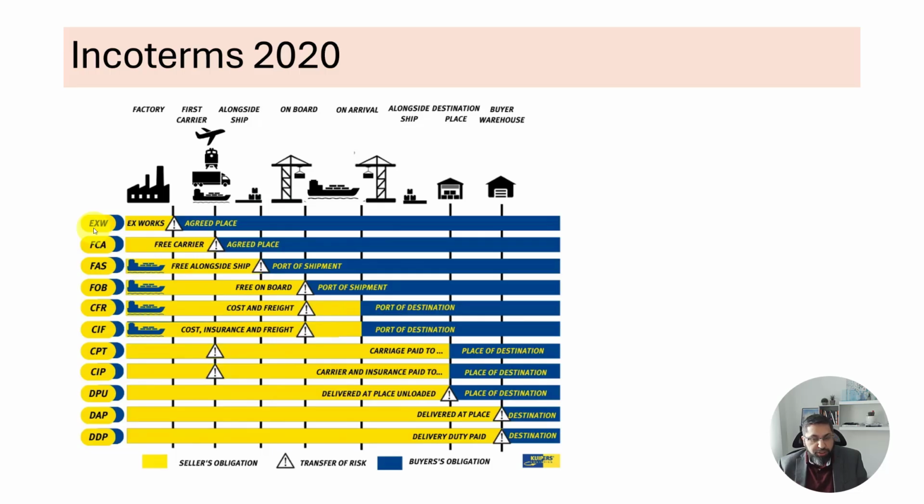But the purchasing team just compared the price, which was the EXW (ex works) price, because usually suppliers give you a price for the goods without adding in transportation costs, just an ex works price. And they said, oh, we can save this many dollars, but they're actually going to end up spending more on transportation now. So when you are selecting a supplier, it's very important to convert the price, adding on the transportation expense to a point that will be shared no matter which supplier you pick.